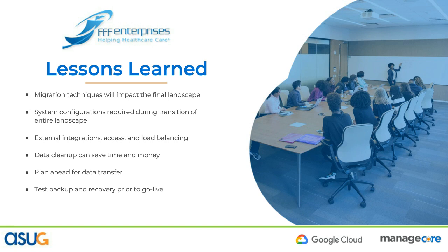So it does impact where you're going to land, and those are things to take into consideration because your business may want to do other projects such as upgrading the OS as part of this process. If you want to upgrade the OS, you probably don't want to use a cloud migration tool. You probably want to do SAP standard migrations. That way, if you're running an older version, we would migrate you and install you on a new OS as part of this migration.